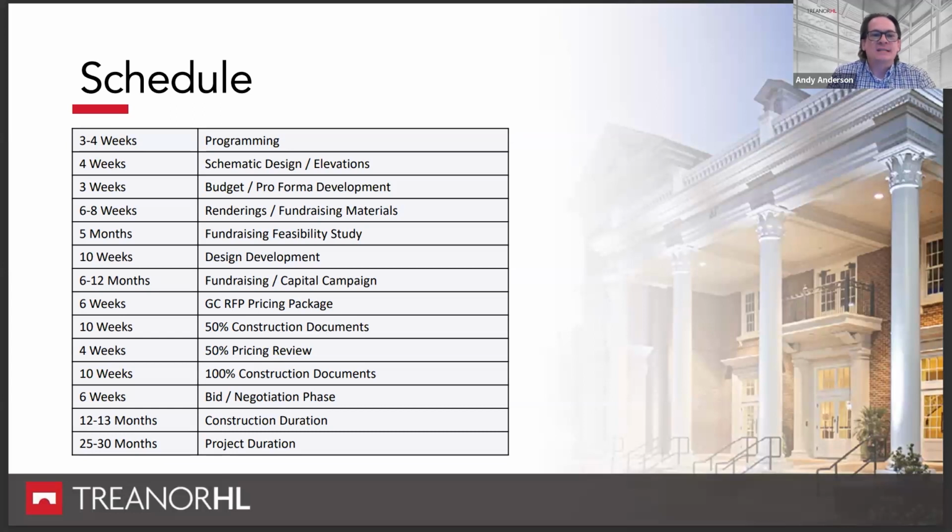is when you move in the house, it's got to be in the fall before recruitment. So the idea is that we work with you from that end date when we know the house has got to be ready to move in, and we work back from that date, including contingencies in the schedule, so that we know that we're starting early enough.